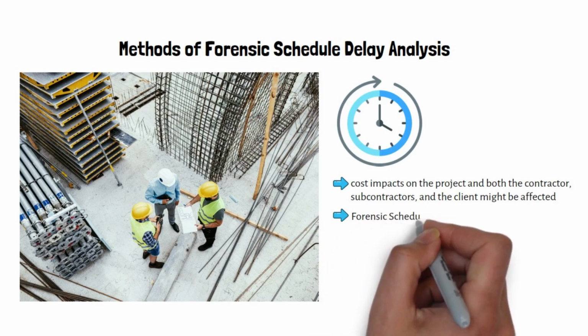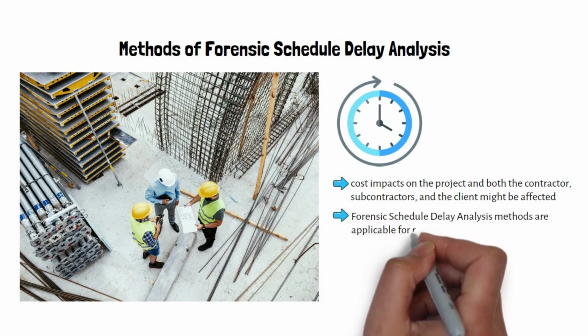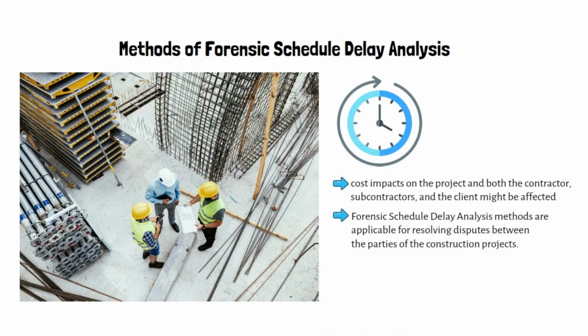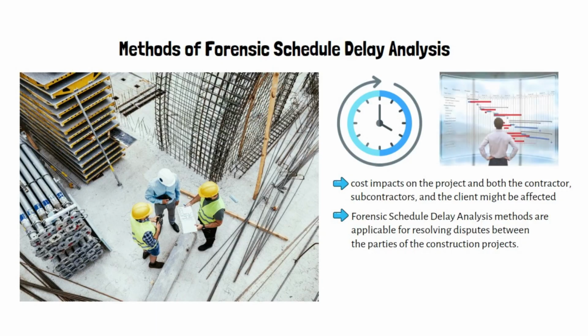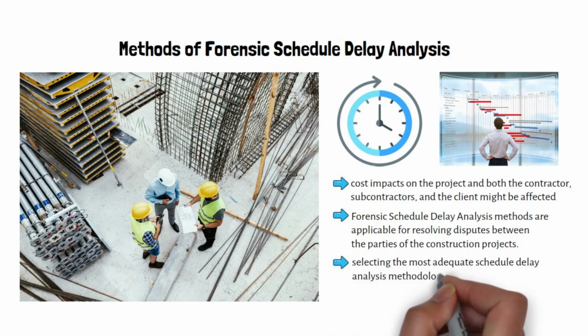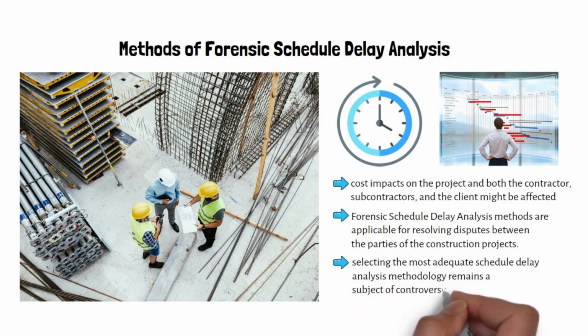Therefore, forensic schedule delay analysis methods are applicable for resolving disputes between the parties of construction projects. When delays happen, schedule delay analysts bear the burden of selecting the appropriate schedule delay analysis methodology to analyze and quantify schedule delays and concurrent delay. However, selecting the most adequate schedule delay analysis methodology remains a subject of controversy.